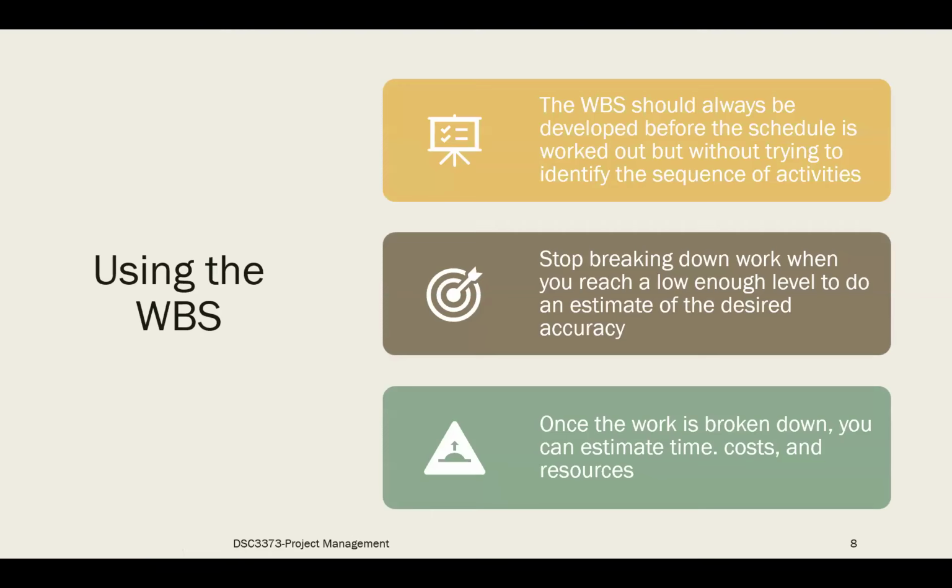So in our process of creating this project schedule, we use the work breakdown structure that we created as an input to the scheduling process, right? The work breakdown structure should always be developed before the scheduling process, but without trying to identify the sequence of events. You don't want to understand the sequence in this case, but you will come up with the different work packages and tasks, breaking the work down.